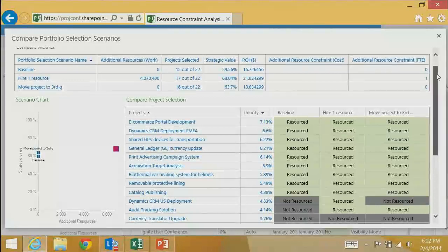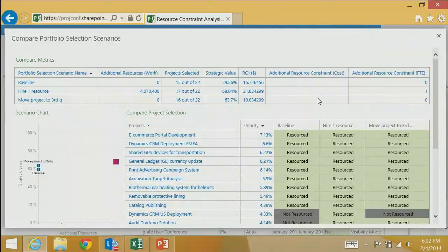So in my case, if the resources have costs assigned and you have that whole thing set up, you can see the additional cost that resource will cost you. Let's say a tester is $55 an hour. You can see, okay, for that amount of work, you get the additional cost that you need to invest.